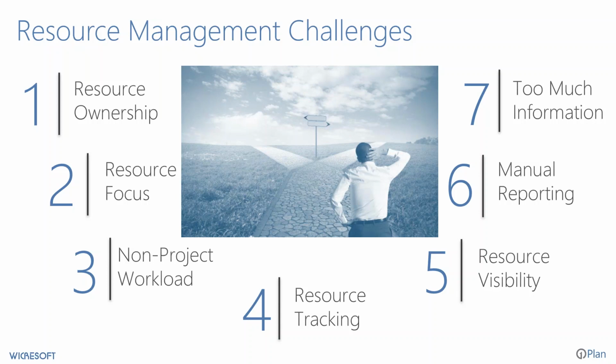And then just resource tracking. Once we decide what it is we want to do or kind of forecast what it is we want to apply as far as resources, at what level of detail are we going to track the resources? Are we actually spending or burning the resources in the way that we planned? Is the actual availability impacted by the fact that we're maybe not working on the things that we plan to work on? And the idea is to be able to reconcile all that and understand where resources are working at any given point in time.